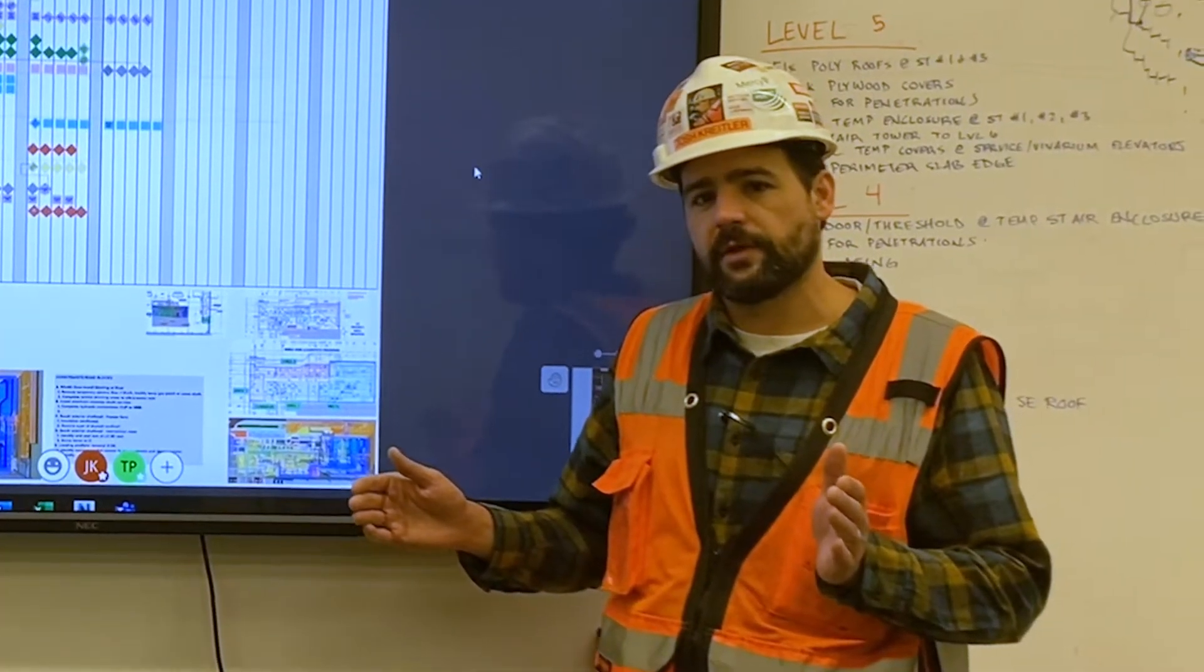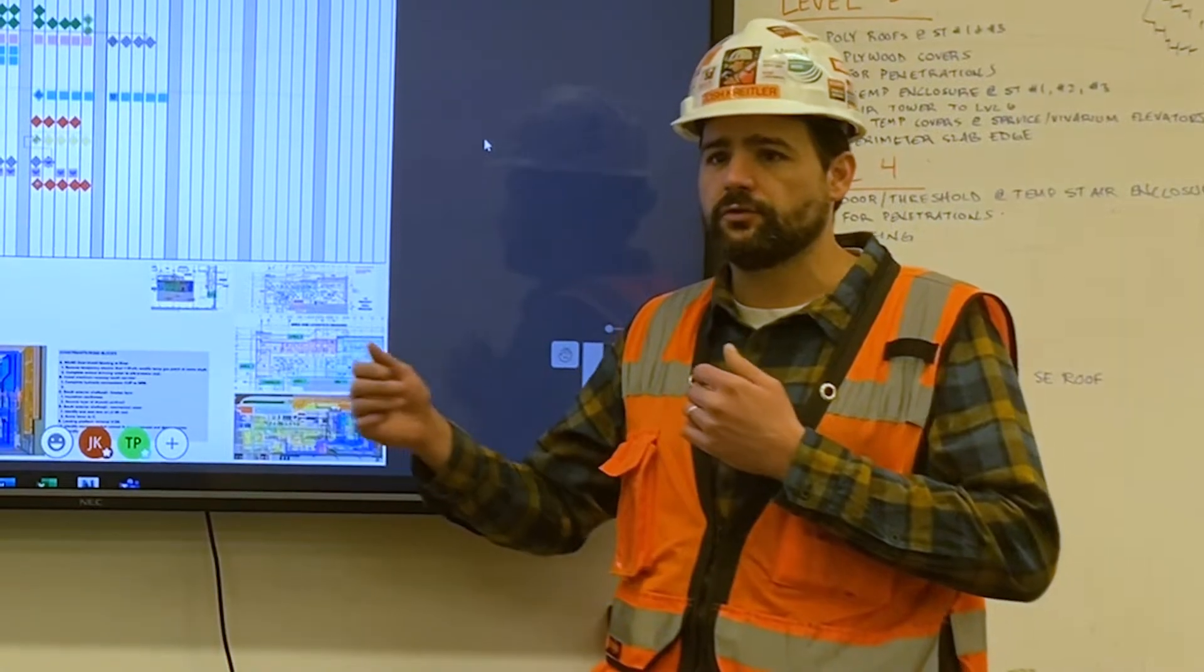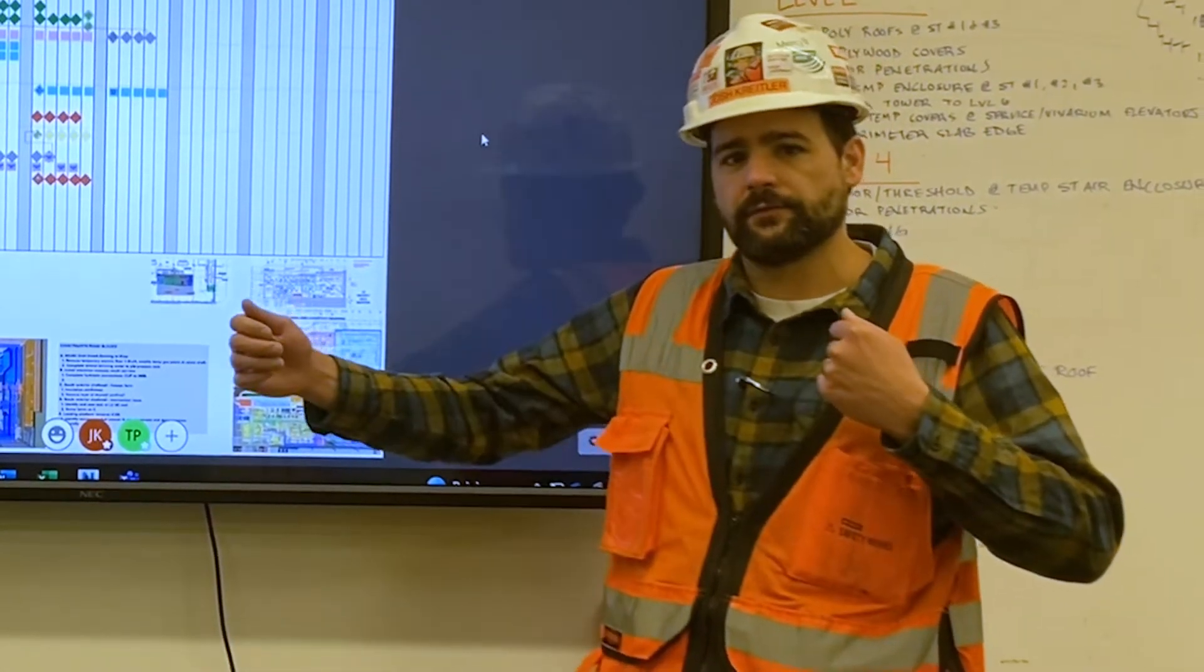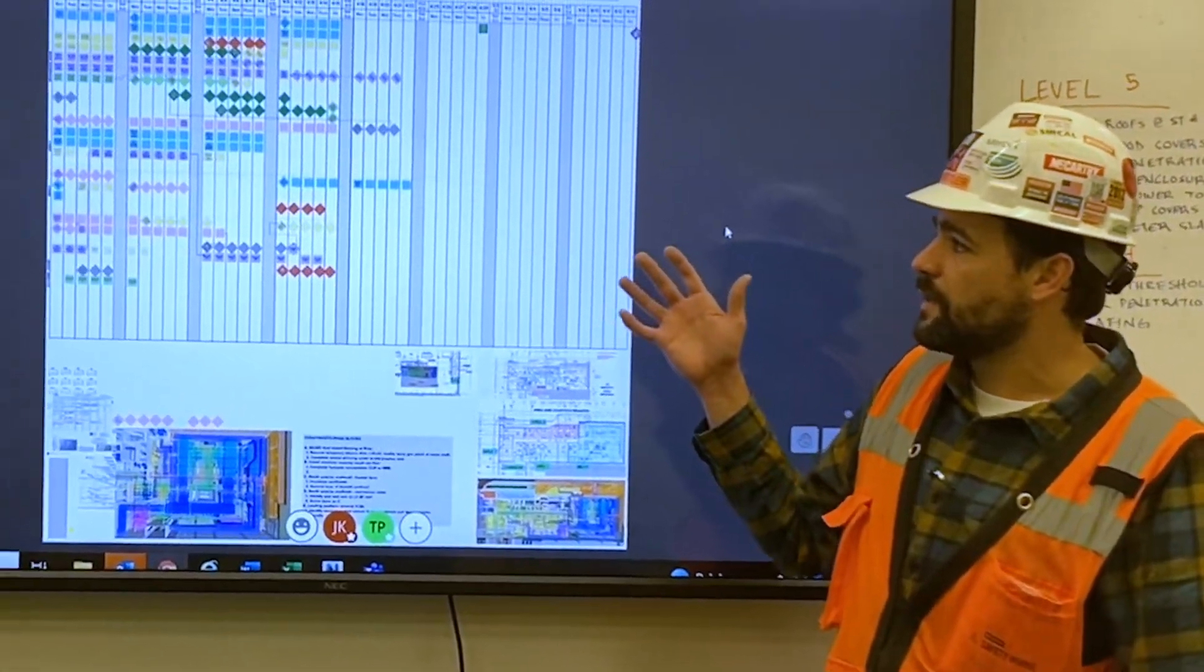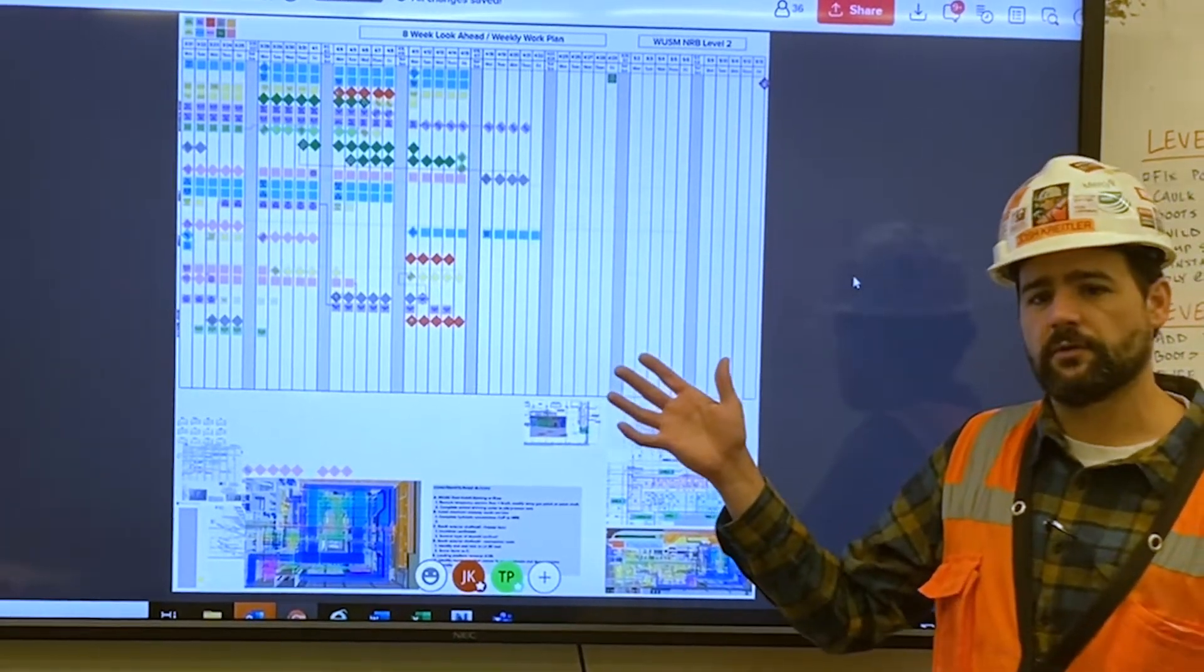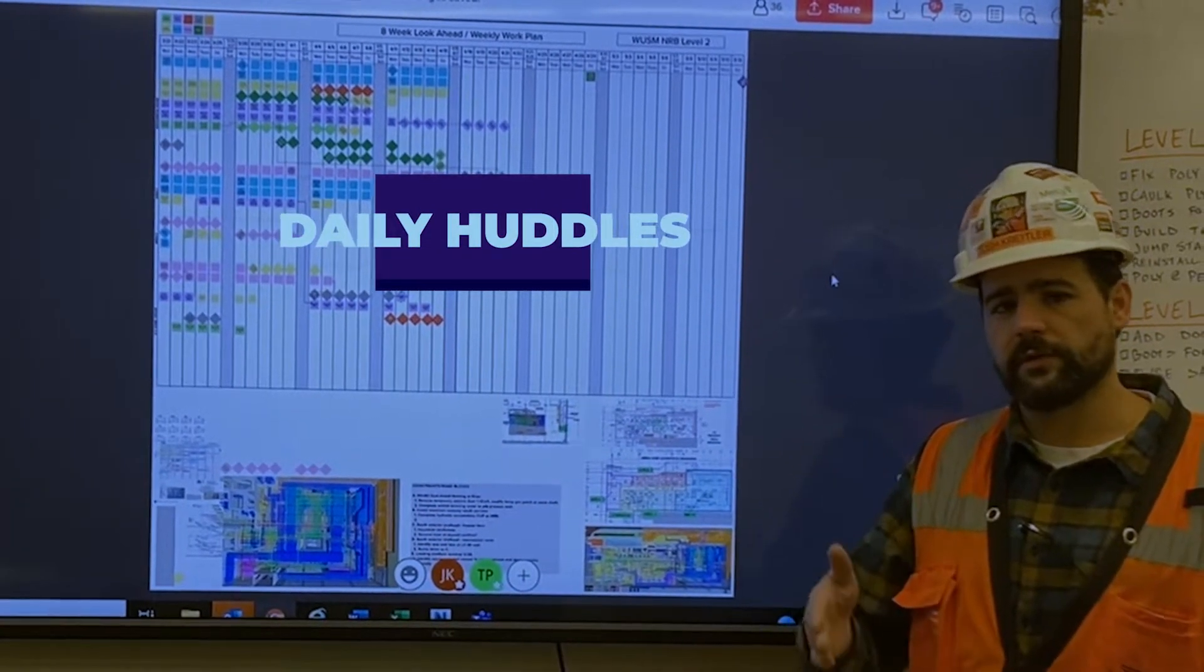So they're represented on our tack plan, but we're implementing a last planner system process in Mural to plan out our look-aheads for six to eight weeks. We work with the trades to build this out and then this gets taken out to our huddles, and that's what our daily huddles are checking against for our weekly work plans and our daily activities.